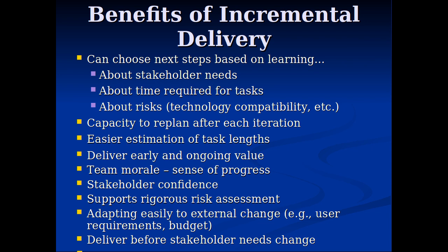And if you're delivering it incrementally, each one, you can always, like for ID3, have the stakeholder tell you, "I was thinking these next two features would be the main priorities at this point, but because of the changes in the Saskatoon Health Region, and now it's the Saskatoon Health Authority, I'm thinking now we want these two other features." They didn't anticipate that at the beginning of the semester, but circumstances changed on their part. Something unexpected happened. They showed the system to one of their colleagues who had an idea for a great new feature. And you have the flexibility, because you've delivered it incrementally, to change path to do that.